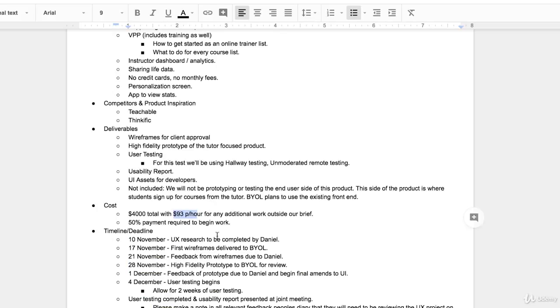So that if they do start asking for stuff that's not covered in the deliverables, you can say, sure, I can do that, but it's going to probably take me another half day. Then they know your hourly rate, so they know it's going to cost X, Y, and Z. I find that's a good way of stopping job creep. Job creep happens with every job. They go, oh, can you quickly just add this extra little thing? And you say, oh yeah, you add it, and you'll decide later on if you bill them for it or not. Then the job overruns, and you either surprise them with a giant bill, or you just suck in those costs, which sucks.